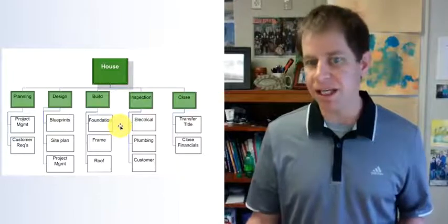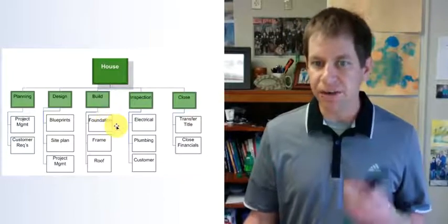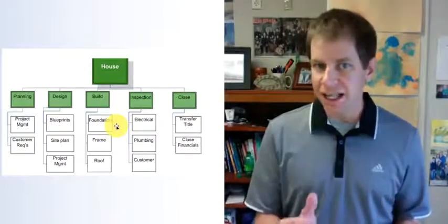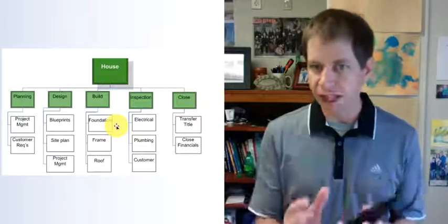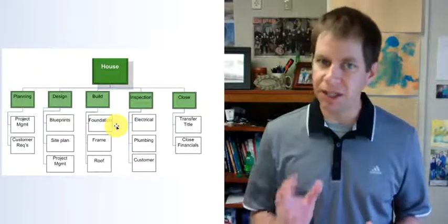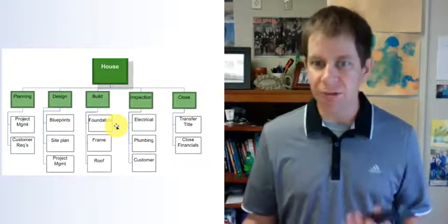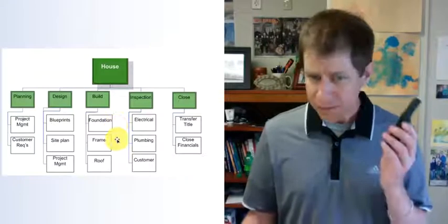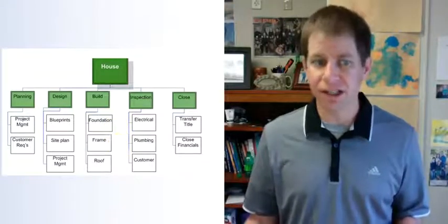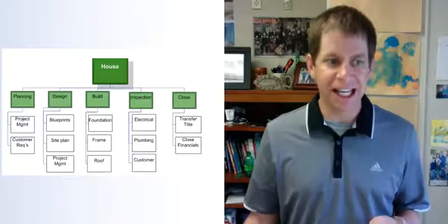What does that mean? So for this example, foundation, define that. And not define the foundation of a house, but define the work that needs to be done so that when someone looks at this, they know exactly what that entails. Every item on your work breakdown structure needs to have some sort of definition in terms of what it is.